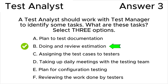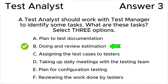Answer B is valid. Estimating the time, effort, and resources required for testing activities is crucial for project planning. The test analyst, in conjunction with the test manager, contributes to estimating the testing tasks. They assess the complexity of test cases, identify dependencies, and provide input to create realistic estimations. Reviewing these estimations ensures that they are accurate and achievable.